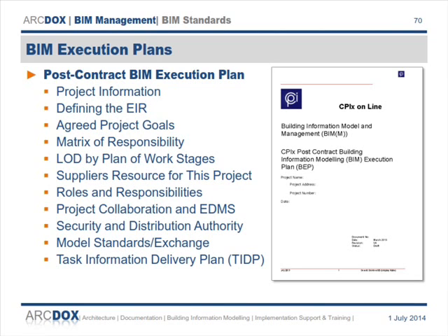We see a lot, and I mean that project is just one of many, but you see the main contractor will hold off on the subcontractor's appointment until the last minute. They'll give an instruction on a Friday to start work on Monday. And they're then playing catch up with the model, and they're starting before they have everything coordinated. And you end up having to take stuff down.